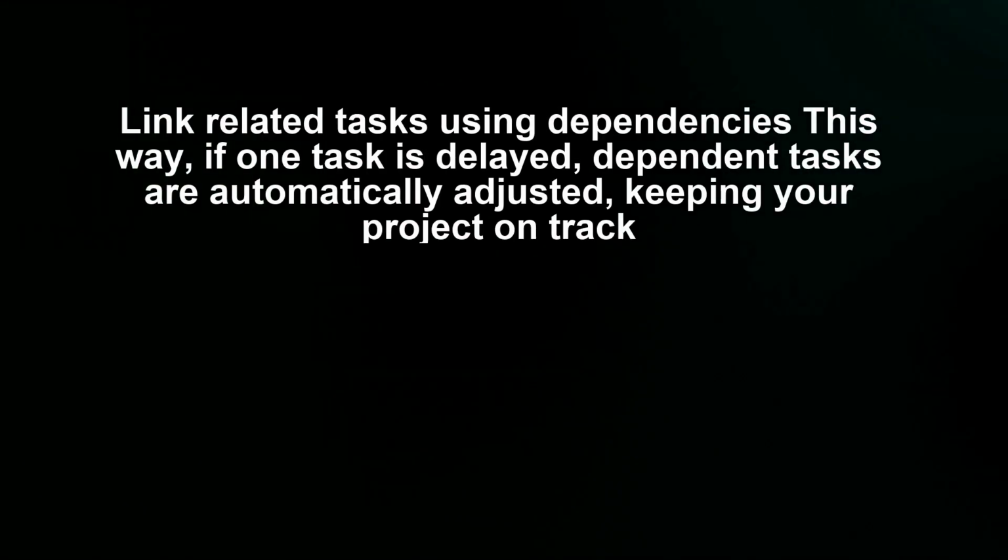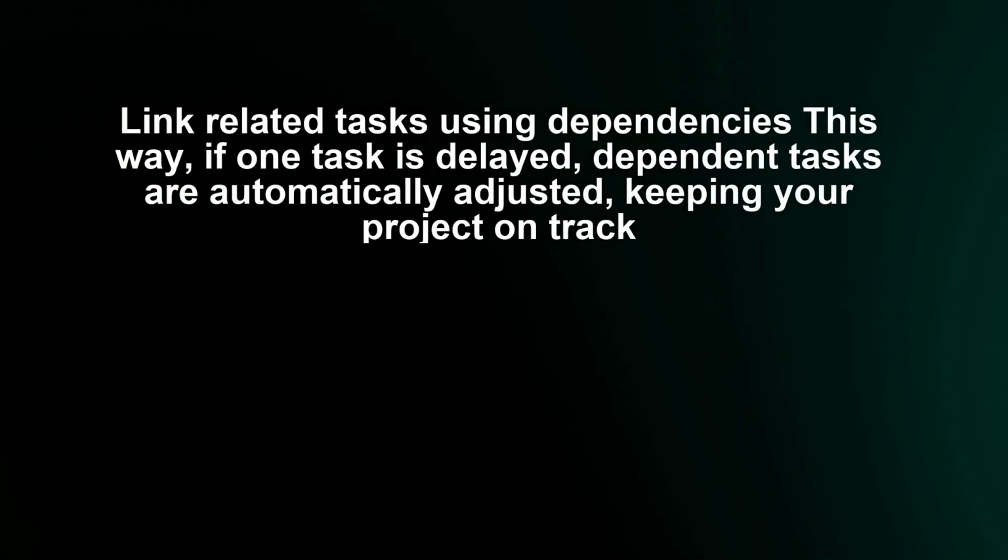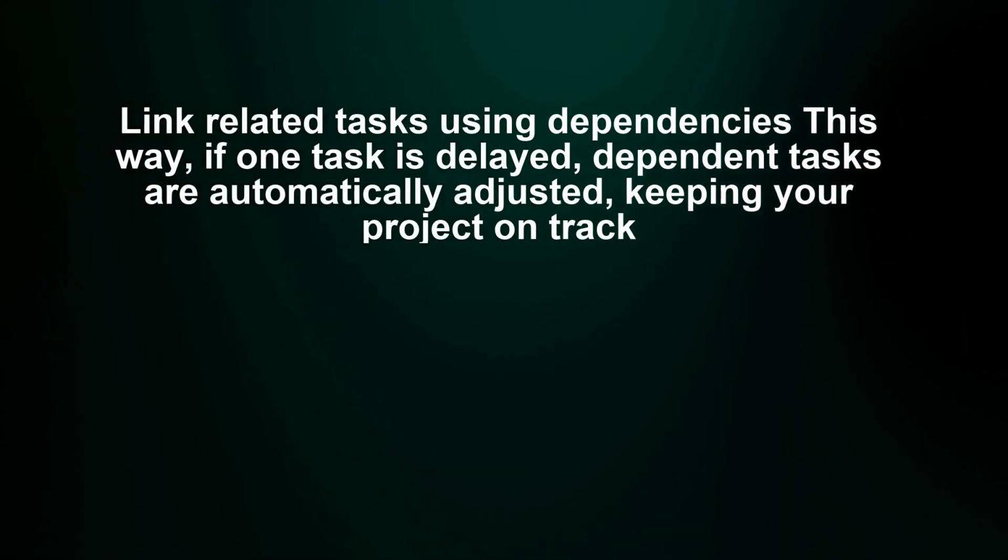Link related tasks using dependencies. This way, if one task is delayed, dependent tasks are automatically adjusted, keeping your project on track.